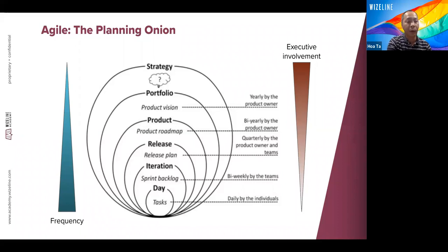to the product level. When we have a product vision, then we define a product, and we have a roadmap of that, or how to launch that product, when to launch the group of features. For example, we have a product to be launched by next year, and that is a very long time. But during next year, we don't wait until the end of the project to launch everything. We define a roadmap for when to launch the MVP version, or version 1, version 2, and then we improve from there. By the end, with time going, we will have a better product and collect feedback from the users quickly to adapt and adjust the product. So every product will have a roadmap.